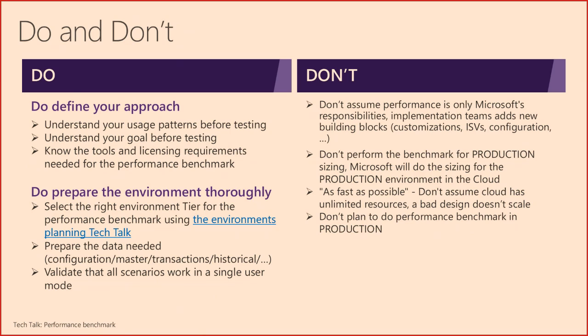The final point is the most important. You cannot use the production environment to do performance benchmark or any performance testing. It will need to be done on a tier 2, 3, 4, 5, but on a non-production environment. In production, what you will be able to do is a final validation of your processes following the go live preparation. And that's it.